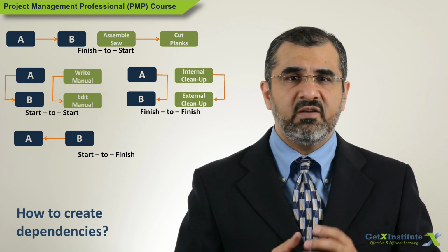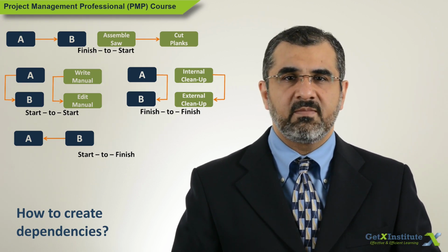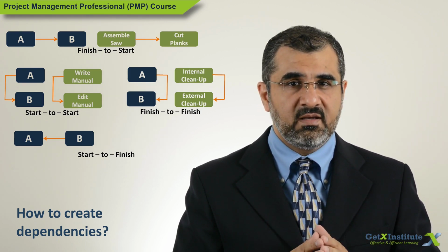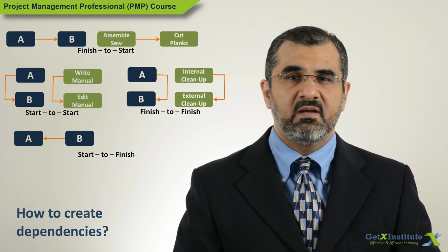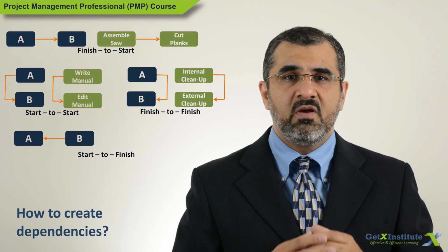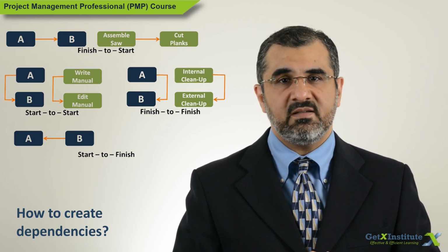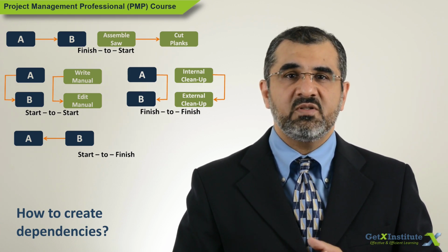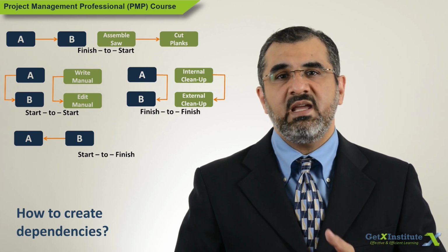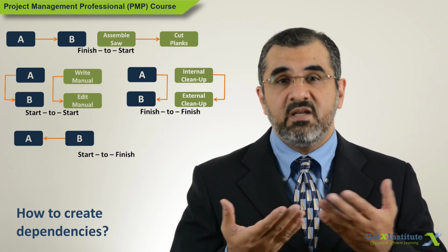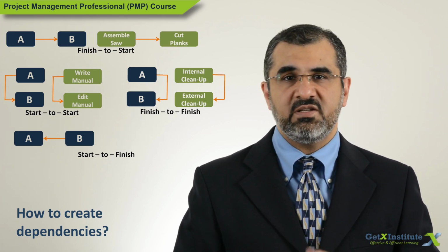It can be a little confusing to understand. Look at it in a different way. Execution wise, A is happening first and then B will happen afterwards. So we are calling A as predecessor and B as successor. Logically, in terms of relationship, it looks like B is the predecessor and A is the successor because A depends on B. Here is an example to explain this relationship.